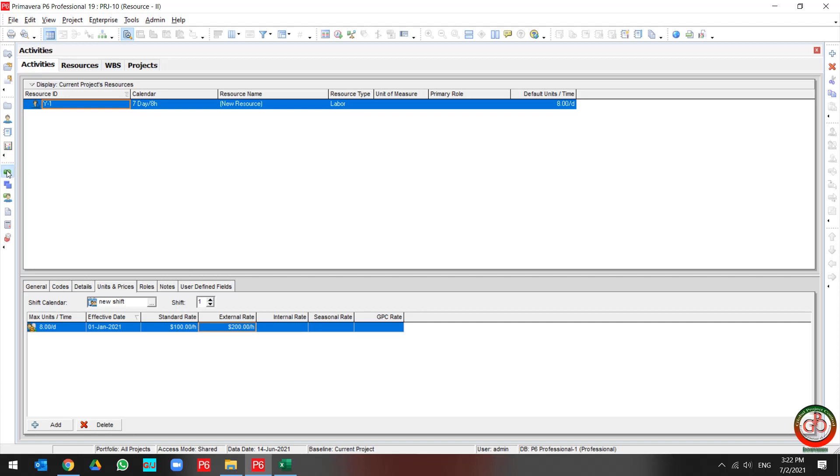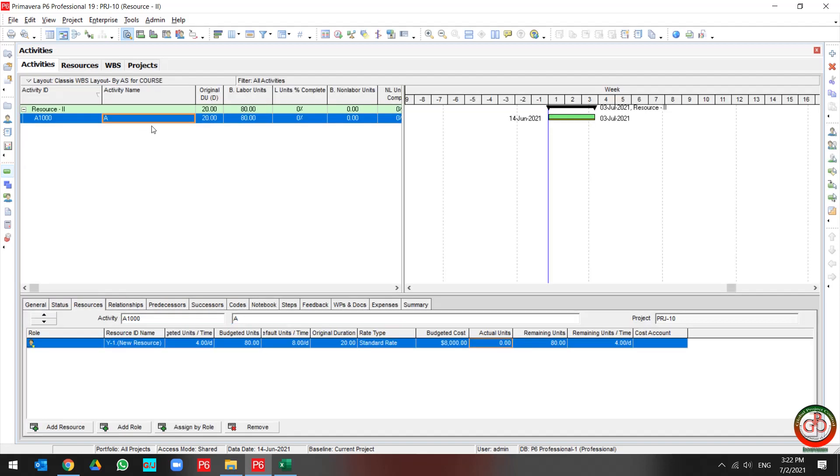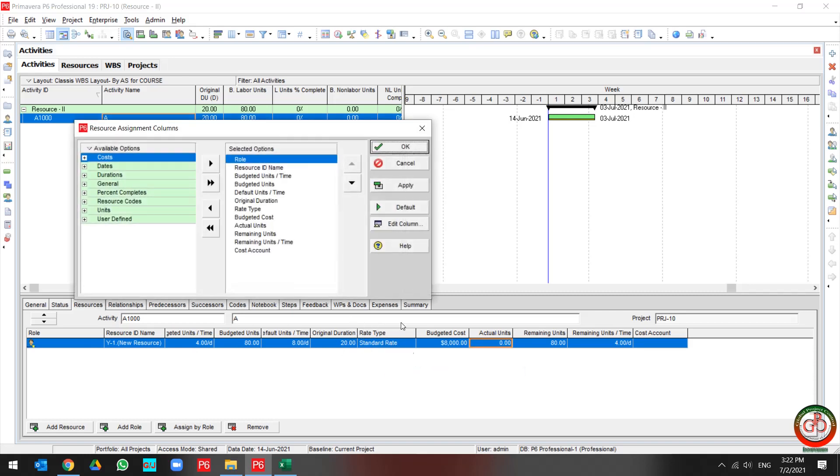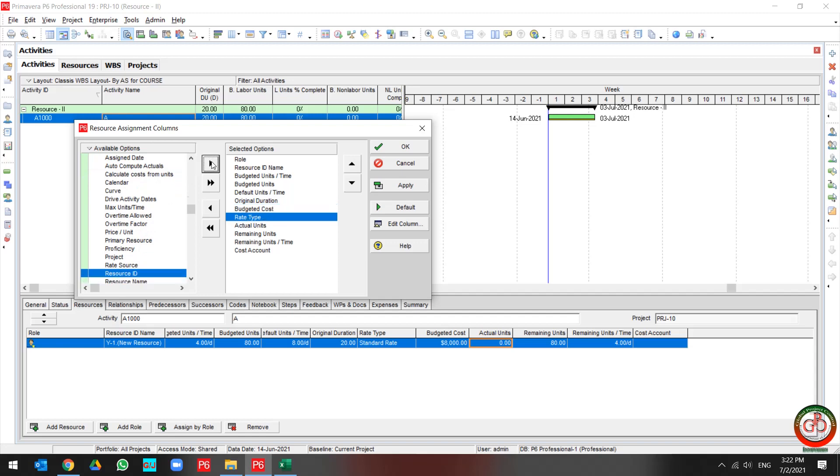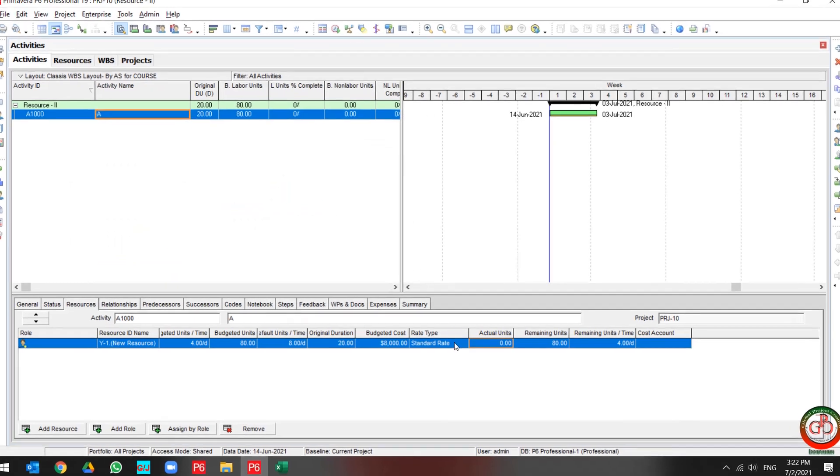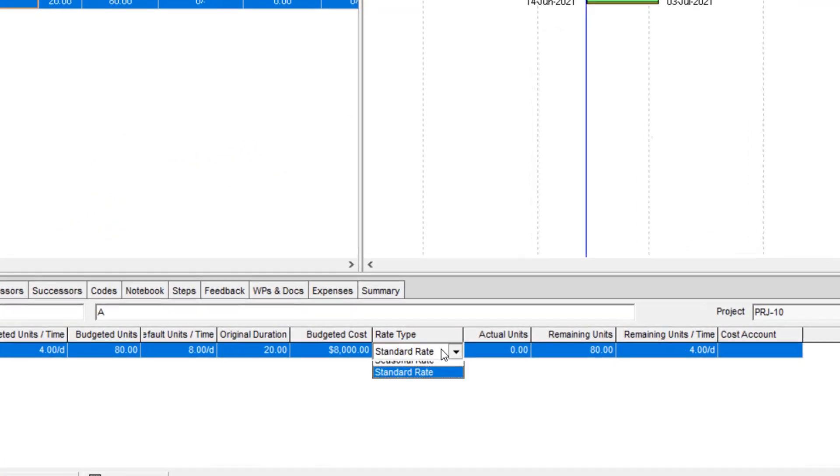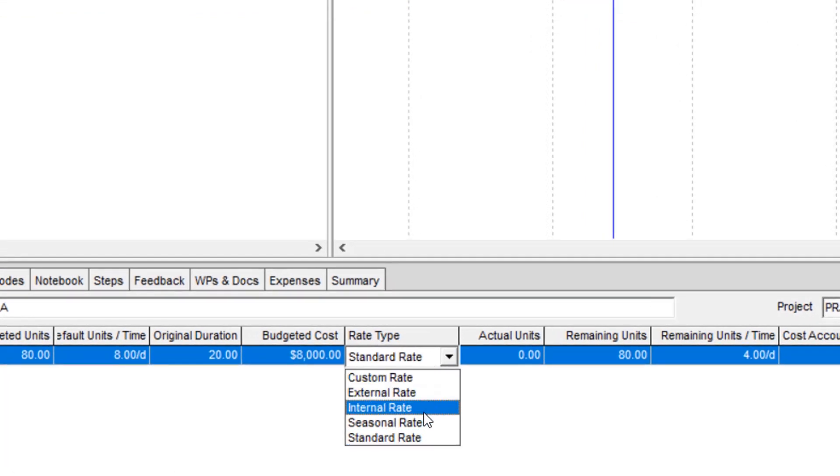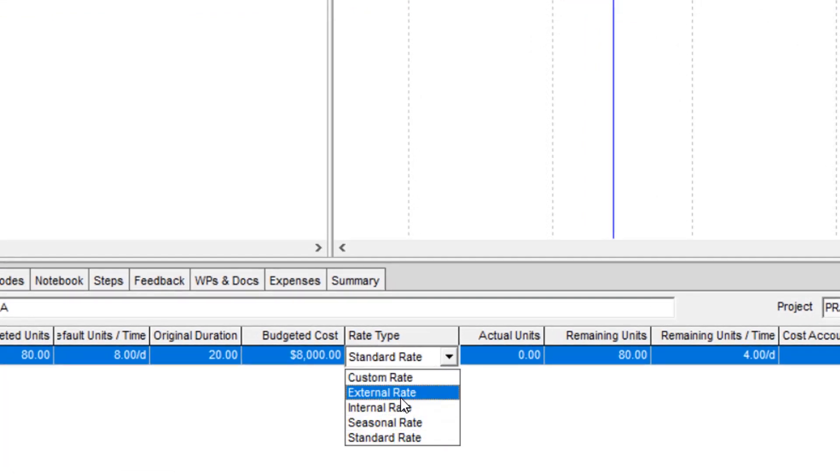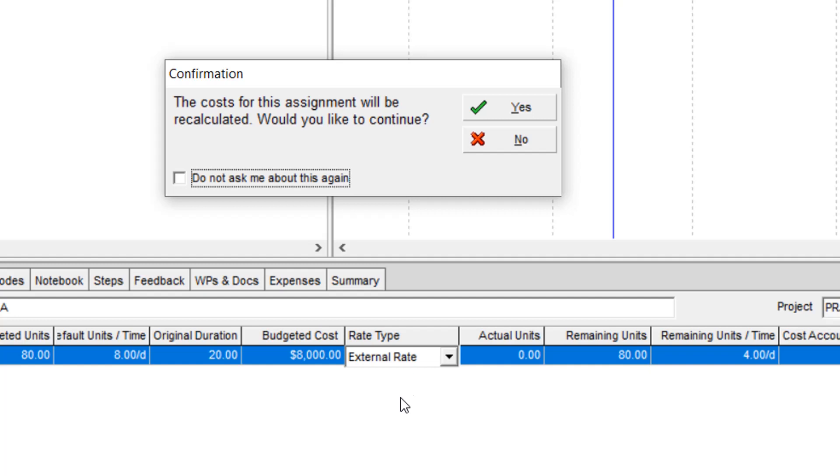So you should come back to the project and change the rate type for the resource. If you don't have this column, you should go to customize and find the rate type from general information. You should change the rate type from standard to external.